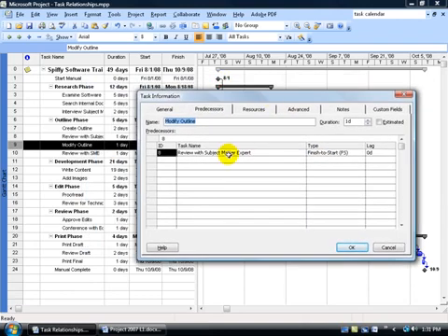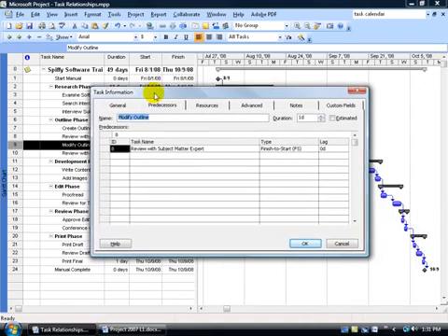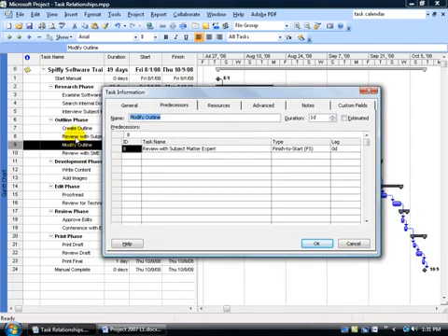And again, who's the predecessor to this task right here, modify outline? You can see it, modify outline here. Well, instead of moving this thing around and trying to find out who its predecessor is, just look down below. It says right here, to this task, its predecessor is review with subject matter experts. And again, keeping that sentence in mind, if it's a finish to start relationship, it's saying this task right here must finish before its predecessor, this task here, can start.